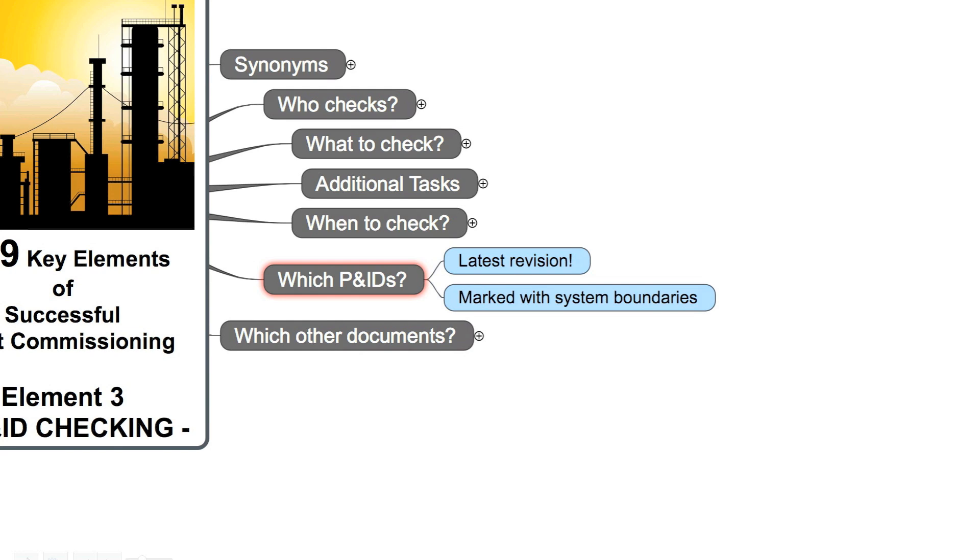Which P&IDs should we use? The most important rule is to use the latest revision only. All P&IDs should be marked with the system boundaries.